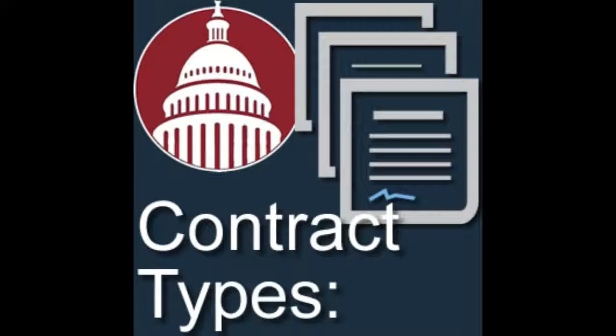So imagine, going back to the travel thing, you need the person to do a whole lot of work. You don't know how many trips they're going to take. So the contract is going to have how much is the salary for the person. That's a fixed fee. They make a certain amount per month, that's their salary. And then the travel is going to be cost, because it is what it is. Yep, now totally variable, and can be totally variable.